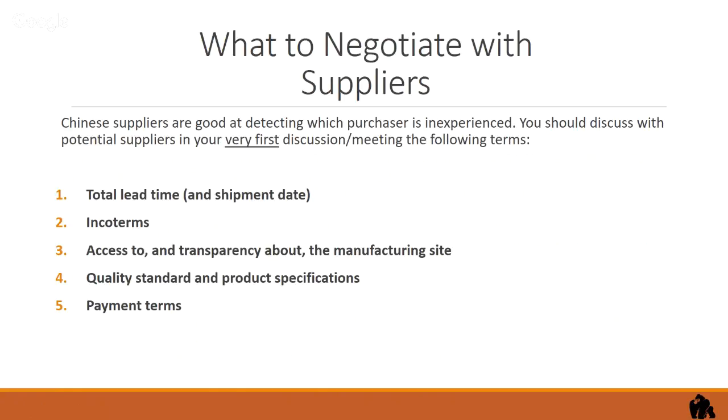Excellent. What about the printing? Well, that's going to take an extra 5 days. 5 days just for printing? Well, the reason is they subcontract it out. They package everything up, send it down the road to somebody else. They unpackage, print them, package them up, and send them back to the original manufacturer you're talking to. So that's the extra time. It's important you understand your supply chain.